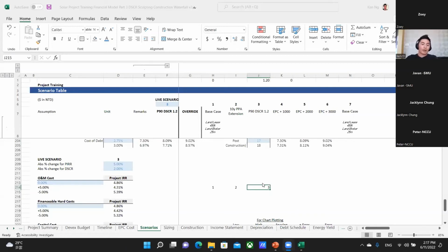Okay, so timeline and MOIC calculations. As in a development game, one of the key things that we focus on is the money that we're betting versus the money that we're making. So under the timeline worksheet, as we discussed just now, one of the key milestones for de-risking the project is the SI approval. The second milestone is getting the establishment permit. The third milestone is getting the land conversion, right? Those are really the three key milestones. And for this kind of project, the land conversion milestone is the most important one. This is the toughest one to get.